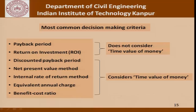Common decision making criteria include the payback period, return on investment, discounted payback, net present value, internal rate of return, equivalent annual charge, and cost-benefit ratio. The payback period and return on investment do not consider the time value of money, while discounted payback, NPV, IRR, and cost-benefit ratio do. In today's discussion we will focus on payback period, discounted payback, NPV, and IRR.